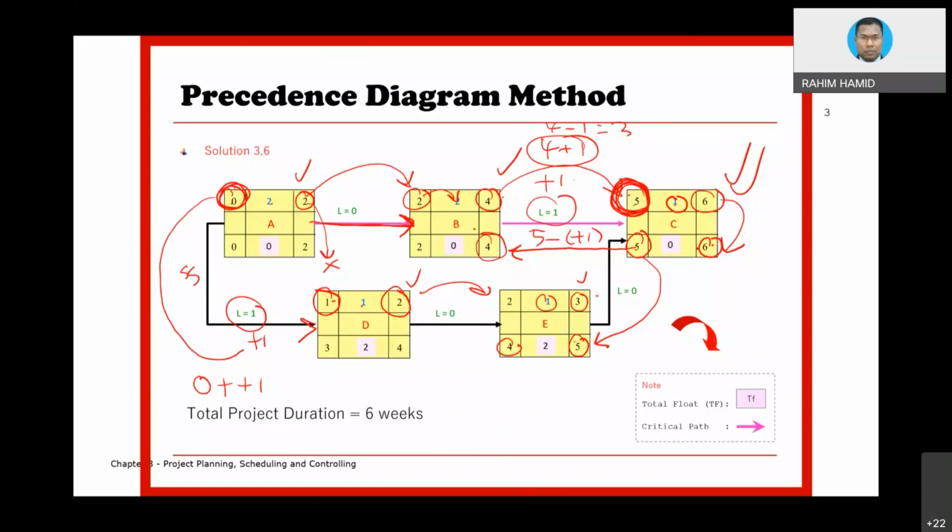If, for instance, the value is negative, then 5 minus negative 1, that will be additional. We are going to encounter that kind of situation later on. 5 minus 1 equivalent to 4. This is how 4 is there. 4 minus 2 equivalent to 2. And then this one is 4. 4 minus 1 equivalent to 3. Okay, the last portion here. How this thing will be affected.